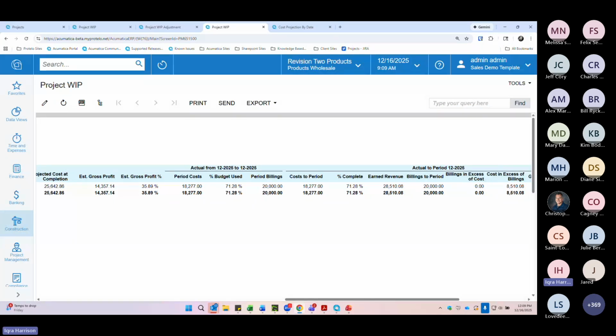In this case, I would say the key is consistency. You would regularly want to update cost projections, run your WIP report based on these projections, and then use the output of this WIP report as the basis of your WIP adjustment that you're going to do on the journal entry screen. Again, this would still be a manual step, and not something the system posts automatically. Other organizations may prefer the system to post the adjustment directly, which is where the second method comes in.